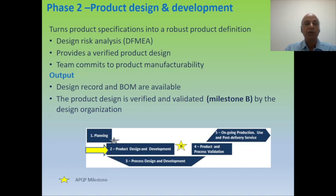In Phase two — Product Design and Development — outputs from Phase one are used as inputs. Important activities include DFMA and design risk analysis. This phase provides a verified and approved product design, and the team commits to product manufacturability, meaning the product design must be such that it can be easily manufactured. Outputs include a design record, bill of materials, and the product design is verified and validated by the design organization — the R&D and engineering team — which is another milestone for Phase two.